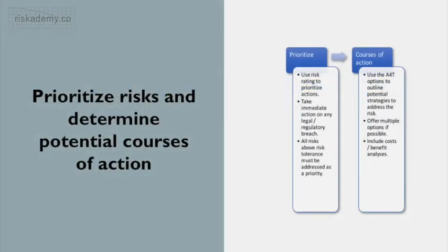First, we prioritise risks for action using the results of the risk assessment. Importance will be determined by the overall value for each risk, but this should also broadly align with the priorities of addressing ongoing incidents or issues, dealing with any regulatory or legal breaches, addressing risks that exceed risk tolerance, and addressing risks that exceed risk appetite. If these conditions are all met, then the risks will be worked through in priority order with the objective of reducing each risk to as low as reasonably possible.